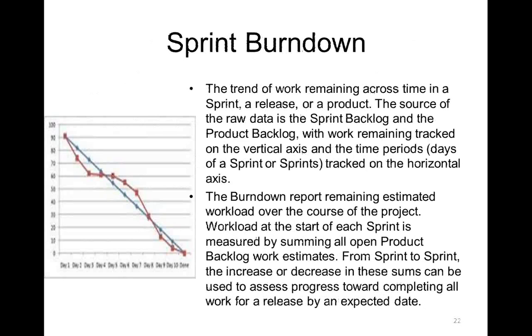Now, how are these sprints measured, and how is the progress monitored during this? One of the activities for the Scrum Master is that he publishes the sprint burn down chart. Now this burn down chart is actually the reverse of what we are otherwise familiar with in any project monitoring and tracking tool. Here the chart tracks the remaining amount of work, not what has been done, but the remaining amount of work.